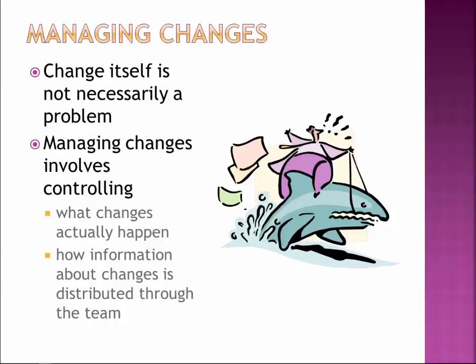I once requested a requirements change that they fought back on. No, we can't risk that. We can't make changes. If we change the requirements, then we would risk the project. I'm like, well, wait, no. If you make this change, I write less code. I can get my code done. If you keep the requirement as is, I'm going to have to spend an extra 2 weeks coding this thing. If you make this change, I can be done right now. Go with it. It makes sense at that point.